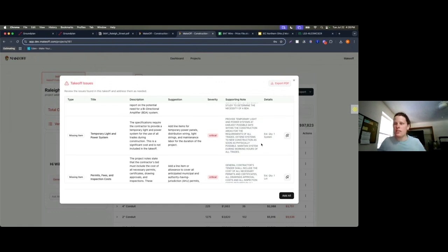Are there any specifics about the facility, wet, dry, Class 1 Div 1, or hazardous location, something like that? I'm asking for my project parameters, and sometimes I wish that was just listed out. Like, this project's going to be EMT. Anything over 75 feet needs to be 10 gauge wire on a 20. Voltage drop in commercial projects is always something that I search for in prints, because they always say something there.